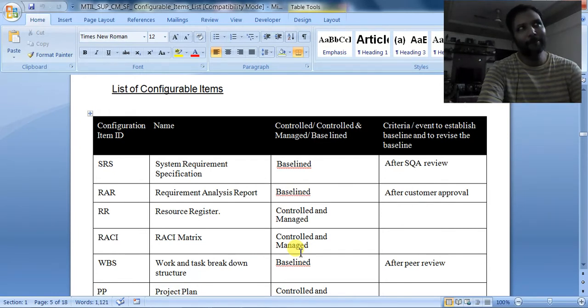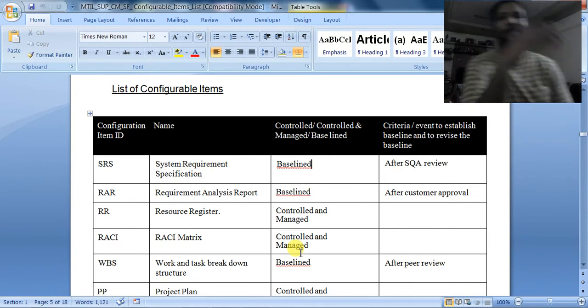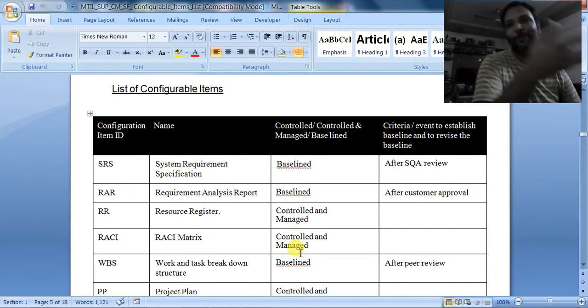Suppose we take the example of the test plan. If I have given 5 days for reviewing or studying the documents, after that test case writing should be done, and I have given test case writing some 10 days. But studying of the documents took 6 days. Then what happens? My dates for test case writing will also be changing.